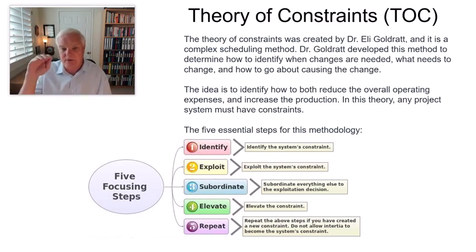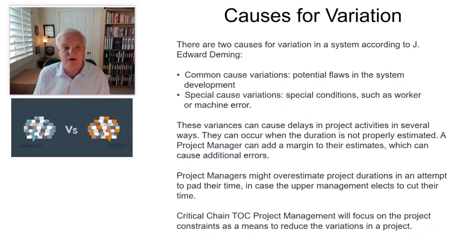Every day you look at the critical path, you look at everything that's set up in the flow and you say, what can we do today to eliminate any of the constraints so that production can continue moving along in any way necessary? Goldratt's formula for the theory of constraints is one that's used by many, many aerospace companies, a lot of the big engineering firms, things like that. It gives them the opportunity to put things on a critical path with multiple projects running at the same time. And that way they can walk in and say, this is the one we need to work on. And everybody shifts over and works on that. And those are the 5 steps for making that happen.